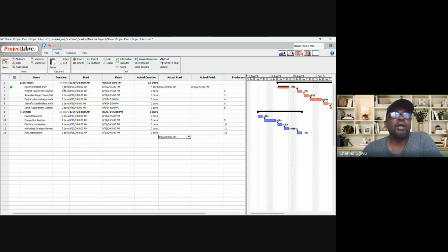And when you start working and you find out that, by the time it's 14 days, you are taking it for approval. That is after baselining, where everybody agrees that you can do this work within 14 days. Baseline means agreement between you and whoever you are working for. You agree that it's going to be done within 14 days.